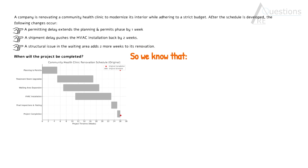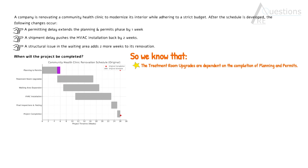Getting back to the question, we know that treatment room upgrades are dependent on the completion of planning and permits. So if we have a one-week delay in planning and permits, that would shift the treatment room upgrades by one week as well, because these are dependent activities. The second thing we know is the waiting area expansion is extended by two weeks. But treatment room upgrades, waiting area expansion, and HVAC installation are concurrent activities — they are not dependent on each other. So this two-week extension does not impact the overall completion duration of the project.